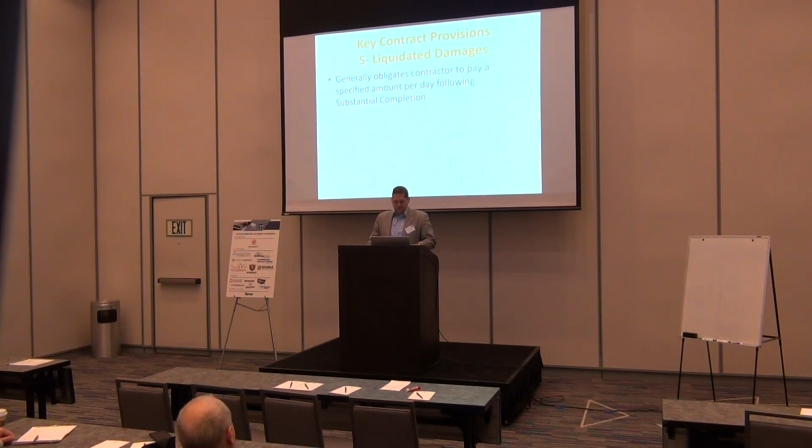And I've seen a couple of different things on that. I've seen some where they give a grace period. So it could be a 30-day grace period. So if substantial completion is November 1, you might get a grace period before liquidated damages are assessed. Number two, it could be that the first period, 30 days, is either higher or lower, depending on what it is, and then it gets either higher or lower after the 30 days.